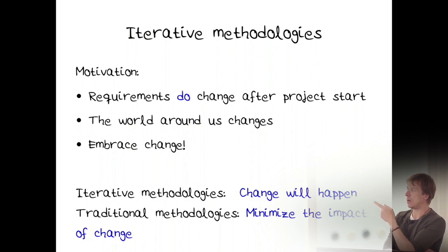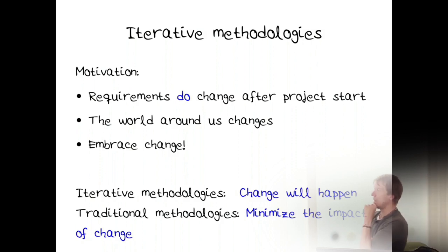So in traditional methodologies, you set up to minimize the impact of change. You formulate the plan and we go in that direction. If anything happens that deviates from this plan, we track those changes and we have change management and stuff. But if most of the time is changes, then you spend most of your time on managing the changes rather than doing the actual work.